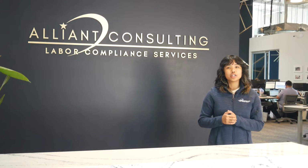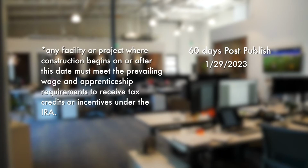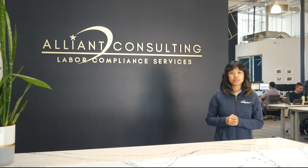The IRA Apprenticeship and Prevailing Wage Provision Guidance was published on November 30th, 2022. January 29th, 2023 is the date following 60 days after the guidance was published, meaning any facility or project where construction begins on or after this date must meet the prevailing wage and apprenticeship requirements to receive tax credits or incentives under the IRA. To determine the beginning of construction on your project, there are 2 main methods: the physical work test and the 5% safe harbor.